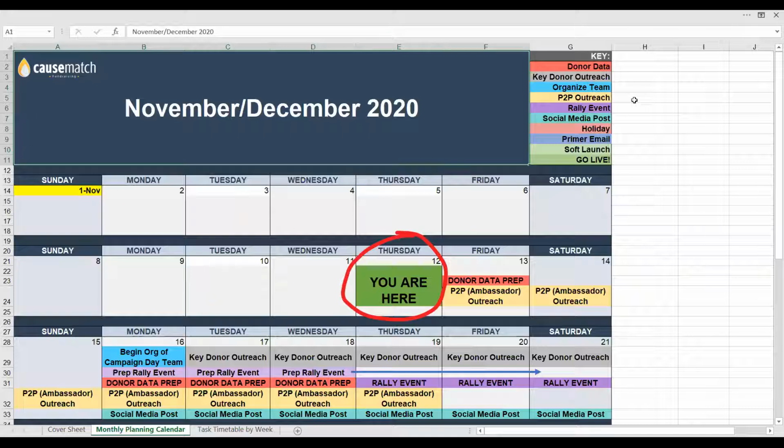If you use any sort of task management software program, this can also be done there by simply putting in the tasks and putting in due dates. You'll easily be able to build it there. If you use some sort of a Gantt chart, same idea. And in the Gantt situation, you can also tie tasks one to another. And if something, for whatever reason, is delayed, you'll be able to update everything else automatically. If not, and you want to use a more simple, basic tool, an Excel spreadsheet just like this really does do the job.